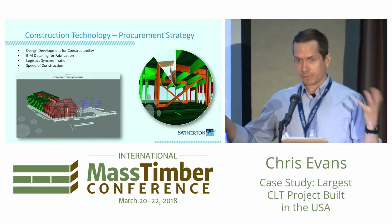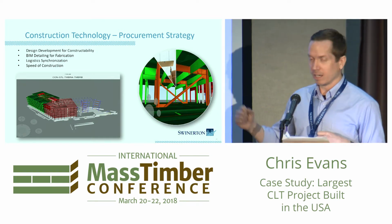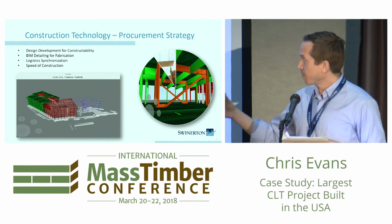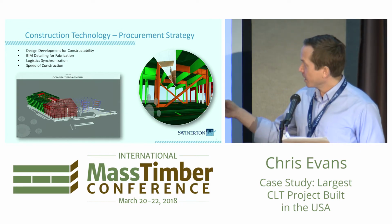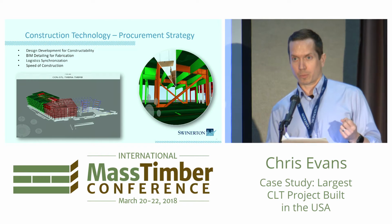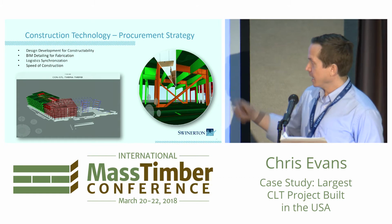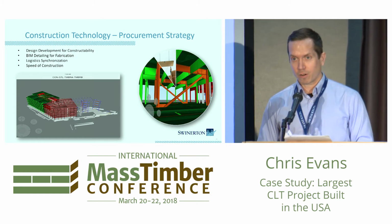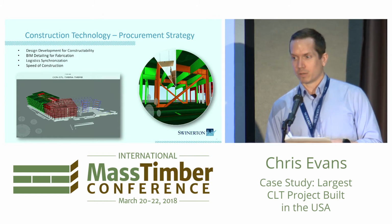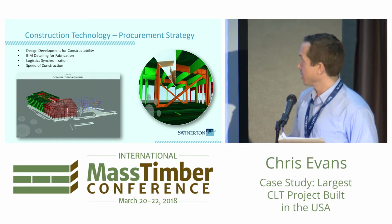So here's a picture of kind of halfway through the job. Right at this time, the green area on the left, that's area A. Those shop drawings were 100% done. That part of the building was being erected. The area in the middle, part B, those shop drawings were just under review and almost ready for production so that we could have just-in-time delivery of the fabricated materials. And then you can see in area C on the far right that we had gotten done with the structural steel shop drawings, but we were still working on the mass timber components. That was the power of kind of breaking this building up and treating it unconventionally.